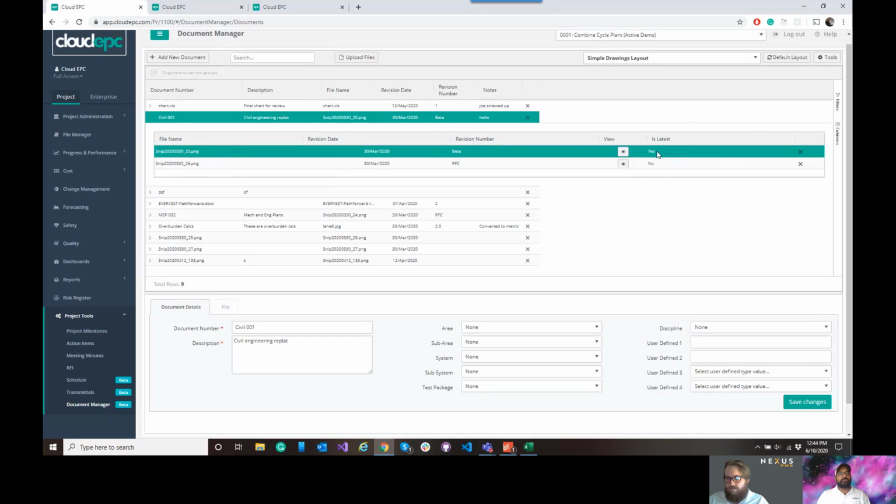The way we view our native applications is that our mobile devices are there not to log in and run really detailed cost reports, but as a data collection tool in the field. The three modules we currently have in our native application start with progress and performance. So again, being able to go out in the field, take a picture of that foundation I've been referring to, update the installed quantity to 500 out of 500 tons installed, hit apply, take a photo of that foundation, and it attaches to that object in the database, and then move on to the next thing you're updating. We feel like that's very powerful.